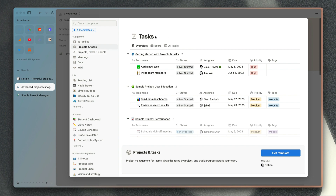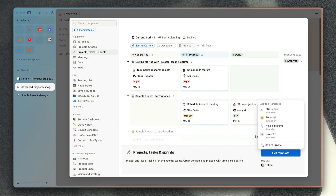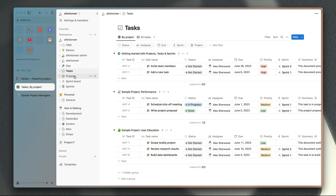The first template is the slightly more straightforward one which just includes projects and tasks. The other template here includes projects, tasks, and sprints. When you duplicate these templates into your workspace, you'll need to use a team space, and then the individual databases — projects, tasks, and sprints — will all appear in your team space as separate pages on the left-hand side. If you've already got the databases installed, it will tell you not to copy the template back into the same team space again, which is generally pretty good advice. You usually just want one master database for each of the databases in your workspace.